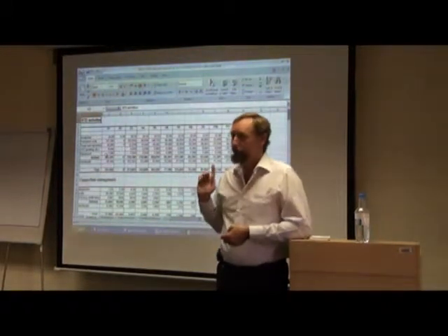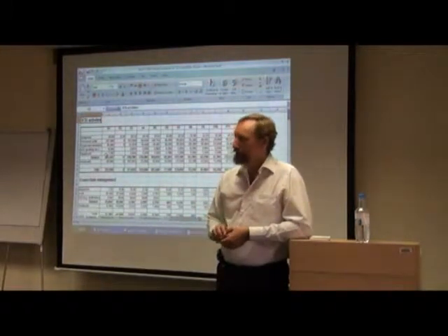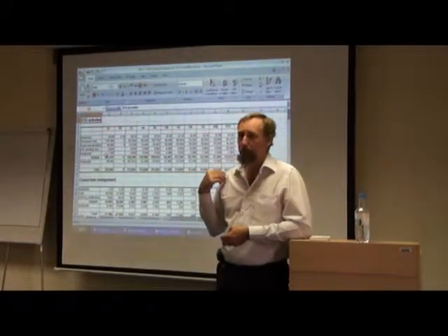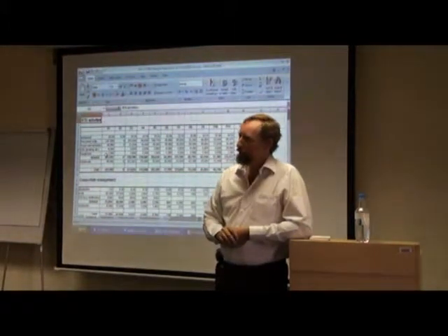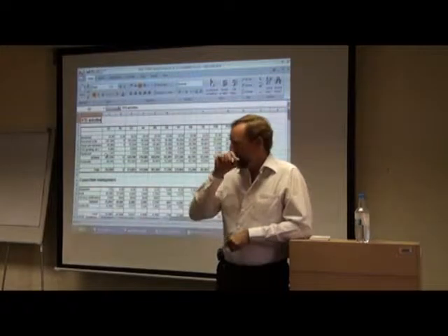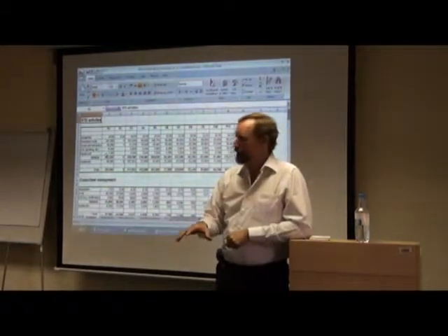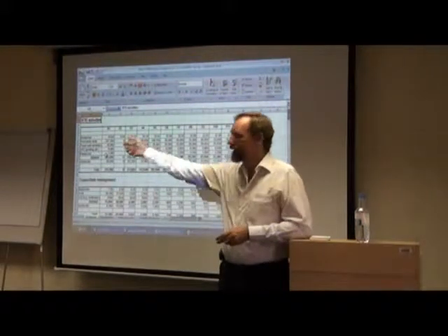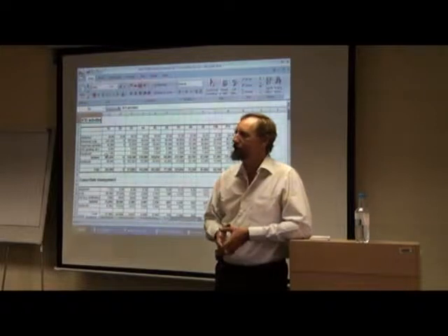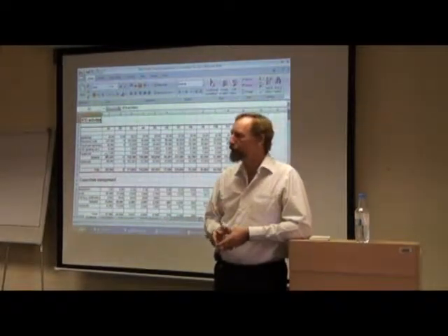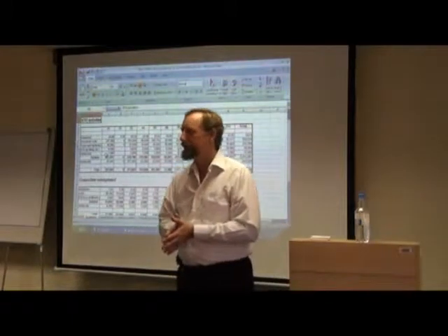Infrastructure is not equipment. And infrastructure generally is not eligible under research projects. So be careful with that. But if you have to adapt a laboratory to install testing equipment for a project, and you have to put in an extra electricity line, I mean, that is a small thing that can still be part of the expenses. But not to replace and rebuild a lab, and that is outside research expenses.